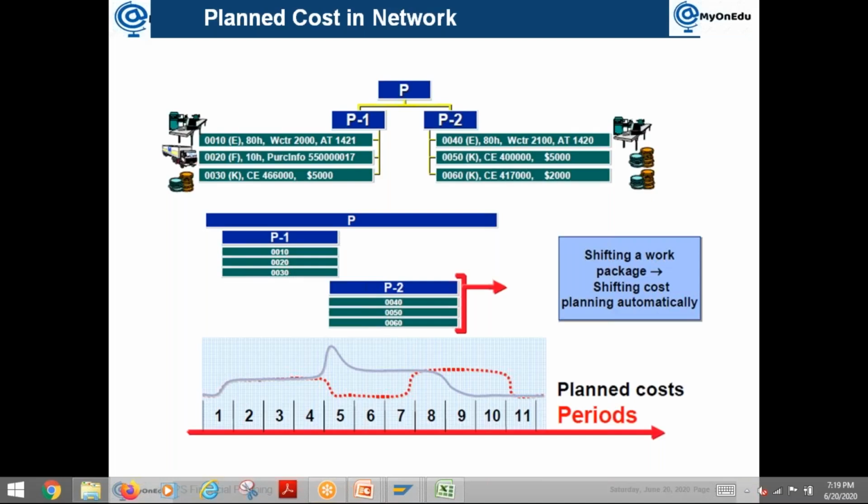So the resources, as I said, we have material, manpower, equipment, then services, and all those things you can plan. Whatever you are planning there, you are already scheduling it. So what happens? A period-wise distribution will come, right? Each activity will be running a span of time.